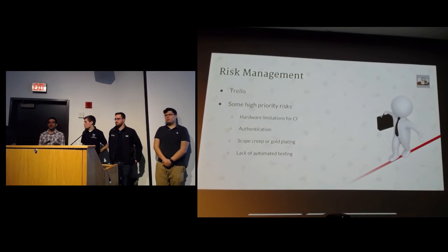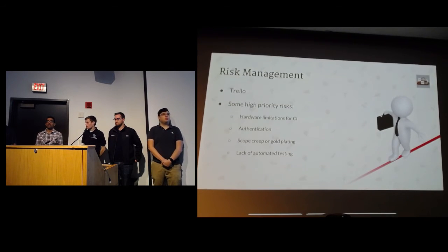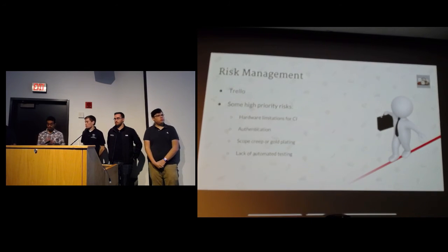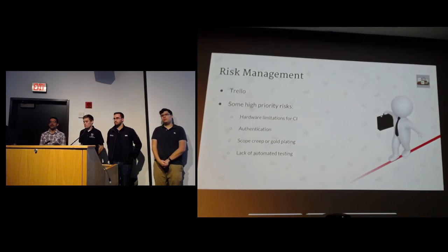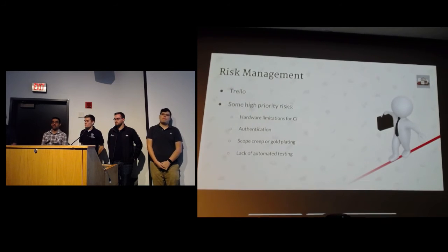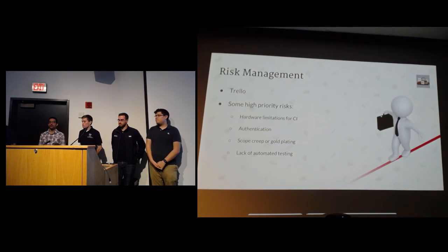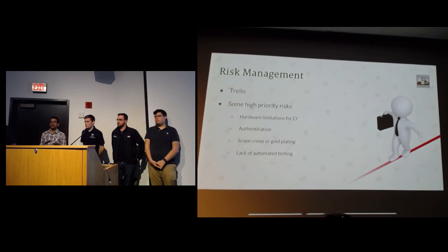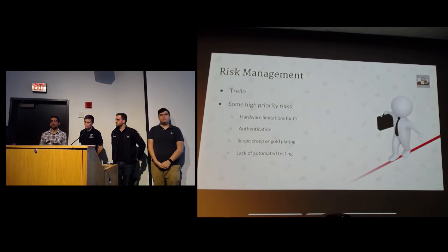We eventually added a weekly risk management meeting as part of our process to ensure that any risks that haven't been brought to attention were specifically addressed. Not to say that we didn't do so at all throughout the week, but we kept that one dedicated time to ensure any priorities were handled.